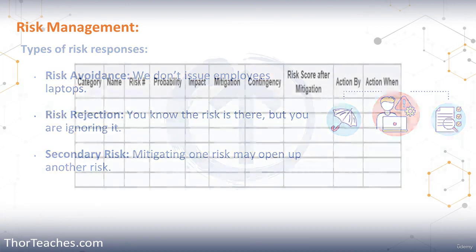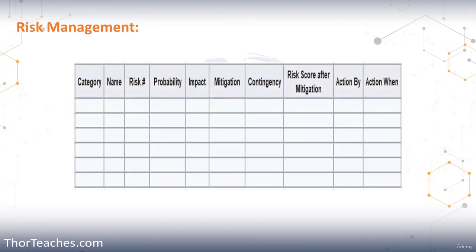In the qualitative risk analysis, we use the risk analysis matrix. How likely is something to happen? How bad is it if it does? And then depending on that score, we go to the quantitative risk analysis on the ones that scored high enough. We put all our risks in a risk register, and whenever we treat the risk, we add it to the risk register. So if we have chosen mitigation, the risk score should be lowered. Now, if that is not lowered enough, well, then we do another mitigation until the risk is at an acceptable level.